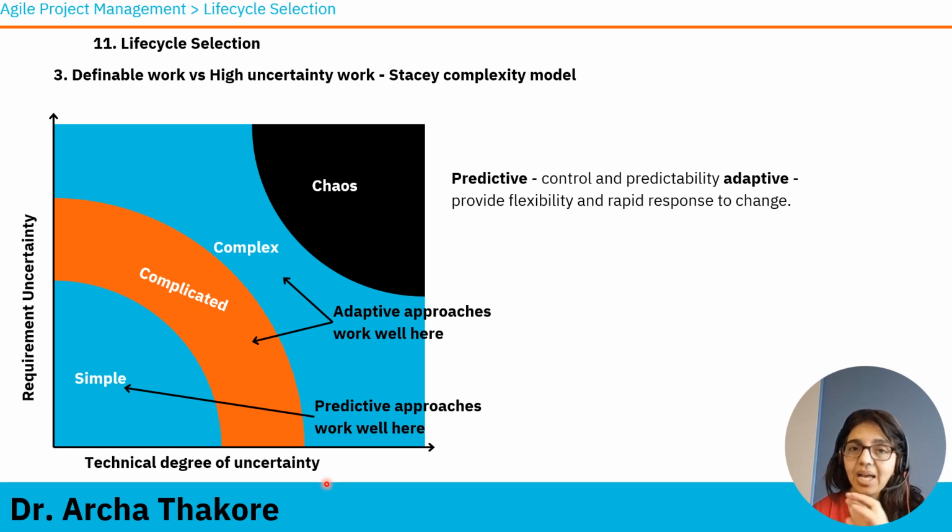Teams can plan and manage projects with clear and stable requirements and clear technical challenges with little difficulty. However, if the uncertainty of the project increases, the likelihood of changes, wasted work, and rework also increases, which is costly and time consuming. So, all these things people need to keep in mind.